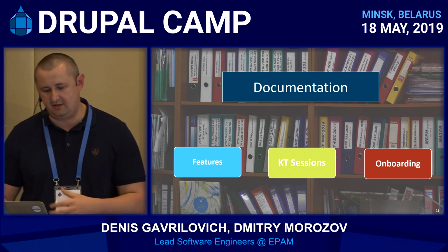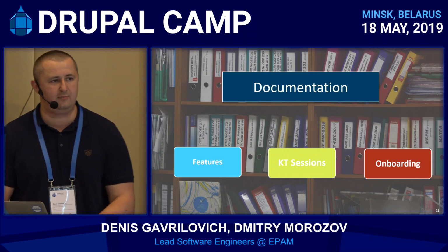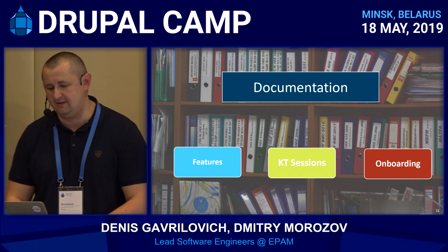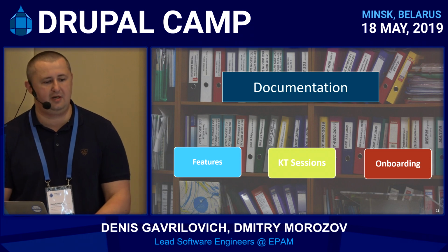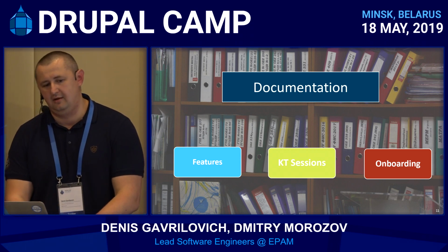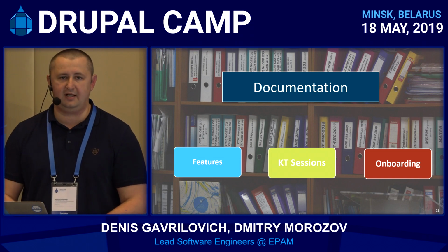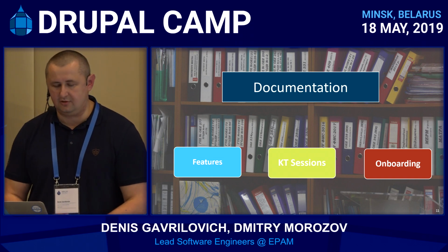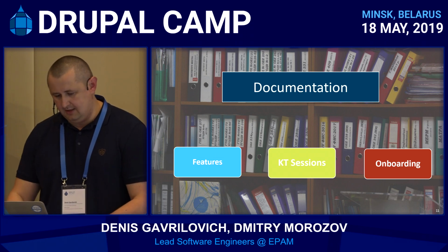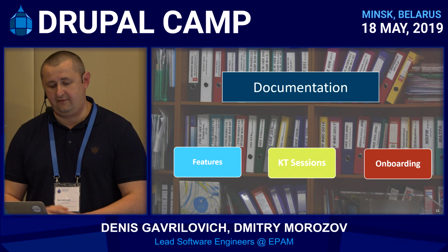And there are 2 options. You can have a dedicated technical writer, who will be in charge of such activities. And another option here, you may include it in your development lifecycle. For example, create an item in your definition of done list, and a feature is not completed until documentation is completed. So it's another approach.